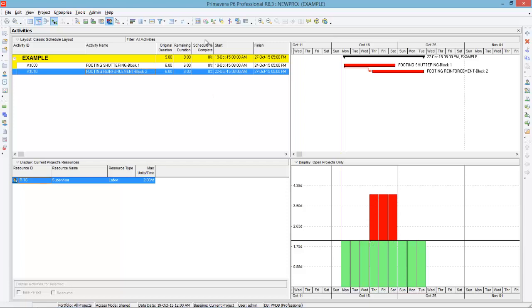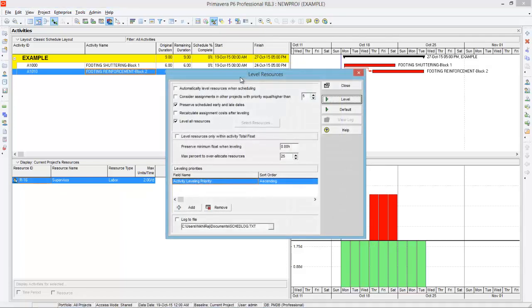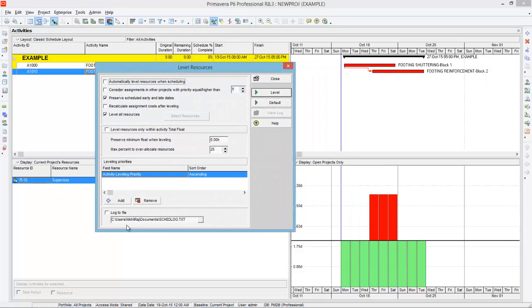Leveling means to clear this over-allocation. There is an option called leveling options. When you click that, the program comes up with some options. This is the leveling resource window. Here you can see two things are checked: one is preserve scheduled early and late dates, and another is level all resources. These options are already checked by default. You can also check the option to automatically level resources when scheduling — if you do that, whenever you schedule the project, all resources will be leveled automatically. This is not a preferred option for me.